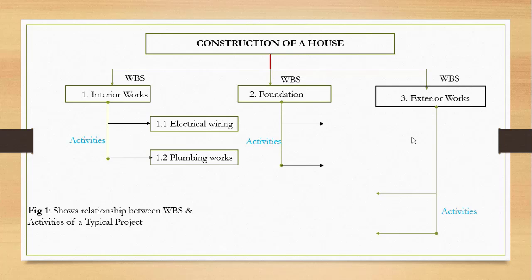So the WBS, which is the interior works, has been subdivided into activities: electrical wiring is one activity, and the plumbing works is another. Under the foundation, we can talk about the foundation excavation as one activity, and then steel erection as another activity with regards to the foundation.